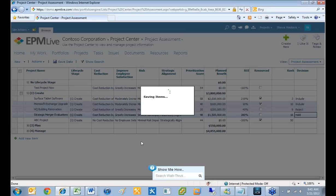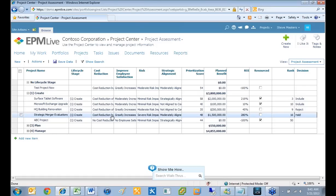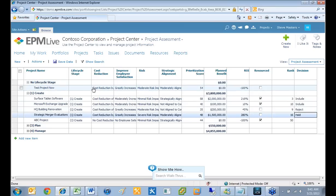I can save that and it will reorganize and prioritize based on that. That's really the selection process. We have another tool coming out very soon called the Optimizer, which basically replaces this view and allows you to pick different criteria a little more nicely — you can say I only want to show projects with an ROI higher than 10%, and it updates and shows the ones that best meet that criteria. That will be coming out within the next few weeks. With that said, that's kind of the basis of the selection process. From there, once a project is included, you would go ahead and build out your project schedule and start actually tracking the work — people would be statusing tasks and so on.